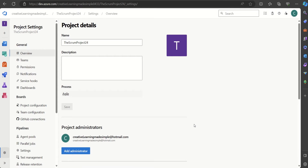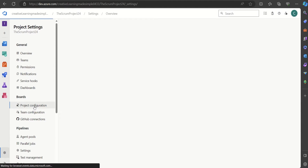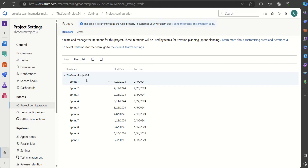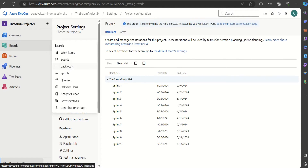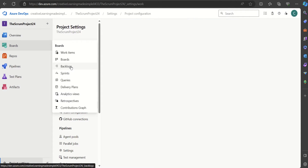If I go to Project Settings and click on Project Configuration, these are the sprints we have defined. So far we have defined 10 sprints, starting from 29th January. Each sprint is two weeks long, following the same cadence of two weeks.